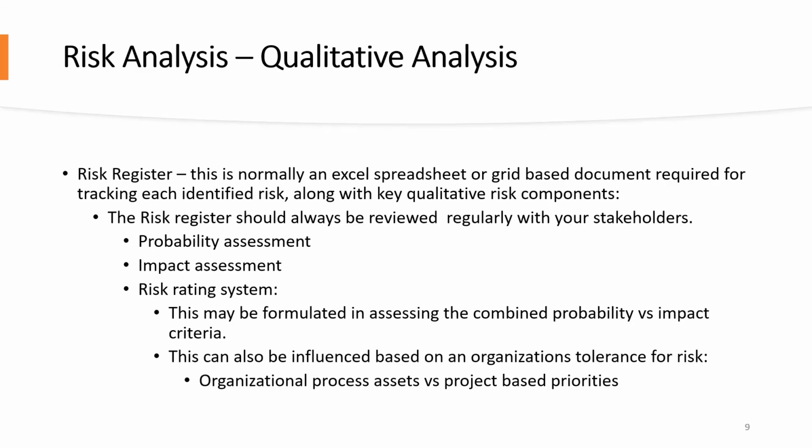There are two types of analysis, qualitative and quantitative. This presentation will focus on qualitative analysis. One of the tools utilized within qualitative analysis is the risk register. This is normally an Excel spreadsheet or grid-based document required for tracking each identified risk along with key qualitative risk components. The risk register should be reviewed regularly with your stakeholders.